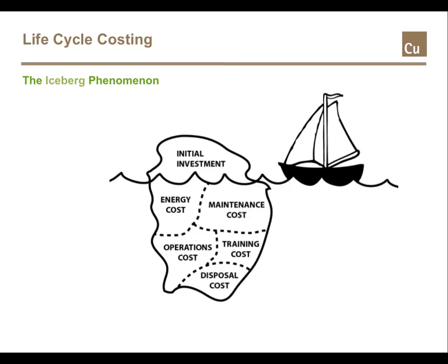A widely used metaphor to explain the essence of LCC is the iceberg phenomenon. At the moment of purchase, the decision maker seated in the boat has a clear view of only that part of the iceberg above the water surface, which merely represents the initial capital investment. However, at that very moment, he is already committing himself for a number of years to all costs below the water surface as well. Typically, when a product consumes energy and requires maintenance, the tip of the iceberg represents less than 25% of the total picture. Nevertheless, many decision makers focus exclusively on the initial investment.